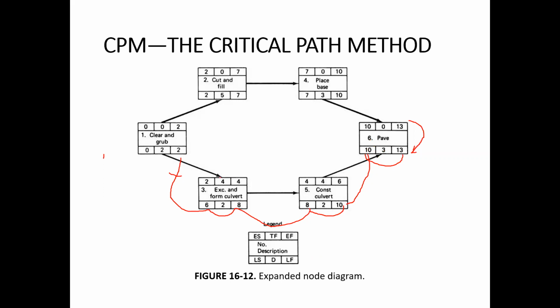So this we have to wait for. So for example, this 10 comes here, and then 10 minus 3, 7 is here, and 7 is here, 7 minus 2 is 5, and then this 2 comes here. Okay, so from here it was 6, but here it was 2. So now from 2 and 6 we will take 2, the lowest value, and then 2 minus 2 is here. So this is how the mechanism of the values will work over here.